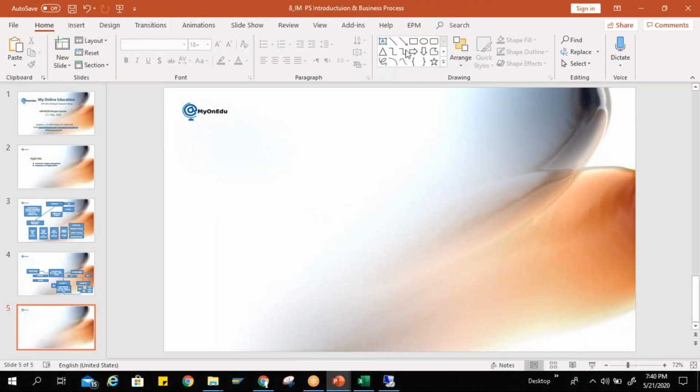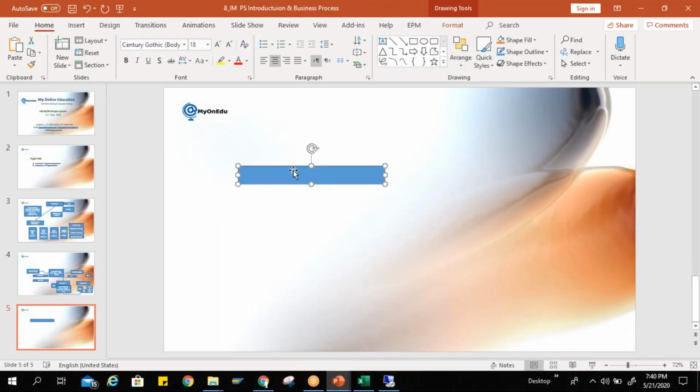We have internal activities. If we are looking to execute any activity within the organization, we create internal activities. Let's say an internal employee is executing that particular activity, in that case we use internal activities. External activities are used when the activity is being completed by an external vendor.